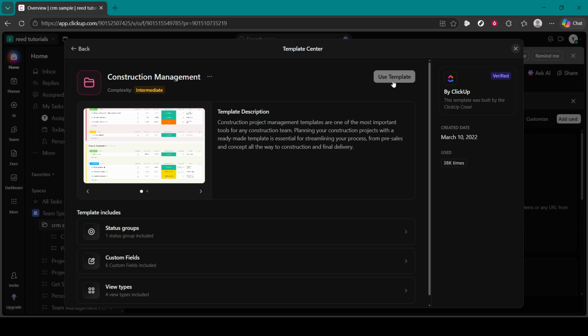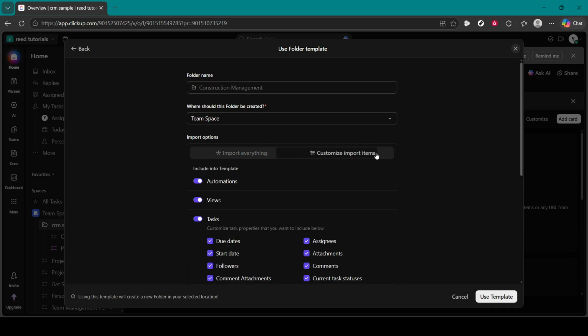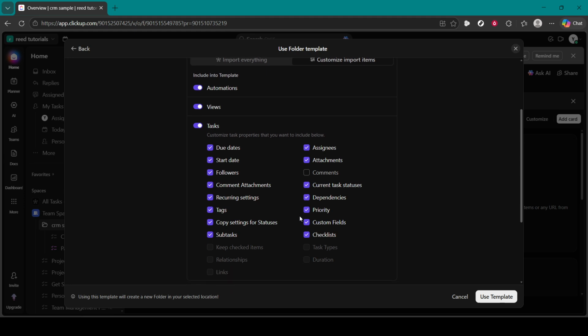Before you dive into tasks, take a moment to adjust how the information is displayed. Switch between list, board, Gantt, or calendar views depending on what you need to see. If you're tracking timelines, Gantt will help visualize critical paths. If you're moving items through stages, the board view is excellent for status-driven work.